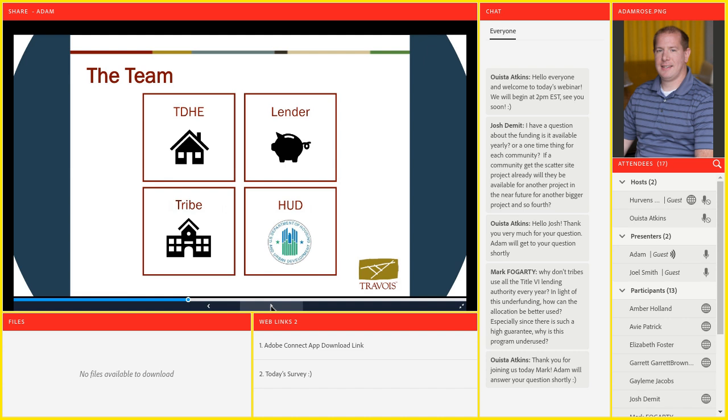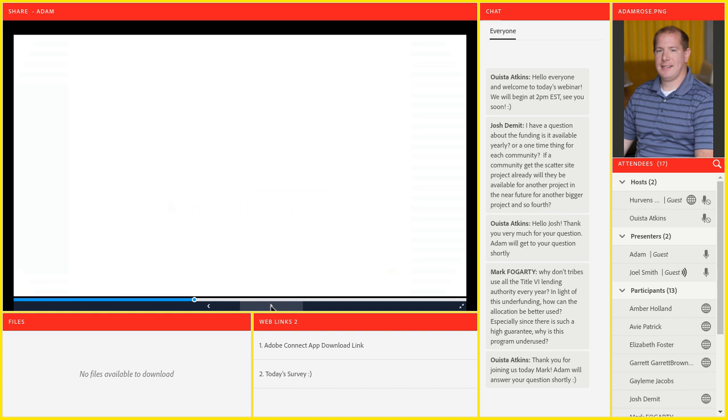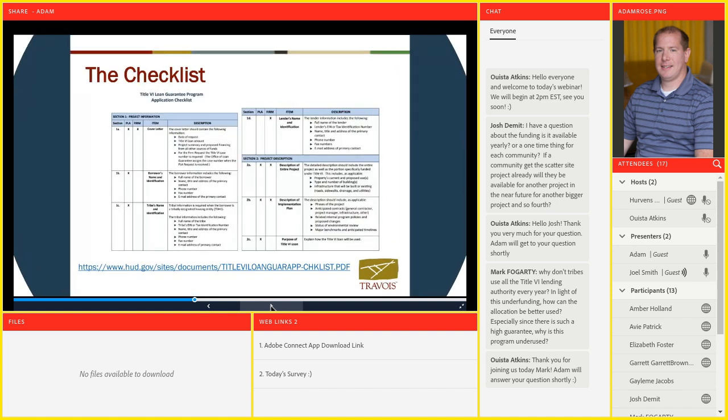Yep, you bet. And so we would be glad to plug into a Tribal Housing Authority developing a project, in the year and certainly months leading up to when they hope to get going. That's when you ought to be arranging for your financing. It's something where you generally have the cost nailed down, even if not the final contract, something pretty close, to really identify the size of your financing need. And a lot of the other legwork that is in some of the pre-development is already underway for site control and design, of course.